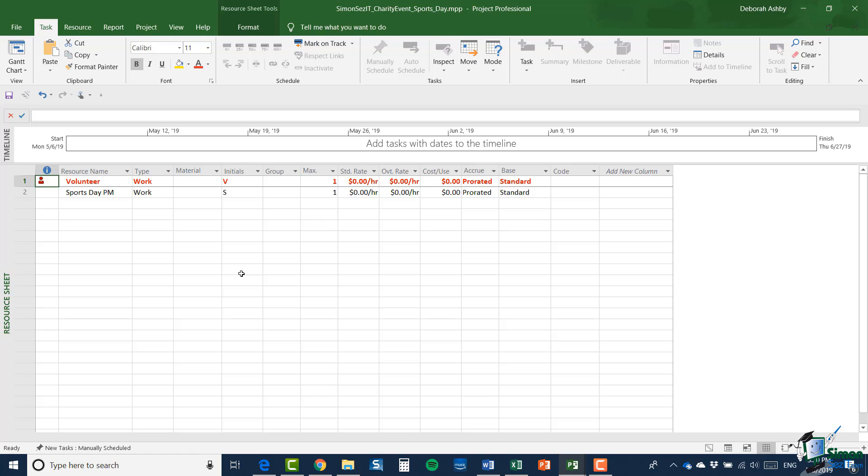Now, in fact, there's an even bigger problem here with the resource because although I now have two projects and they each have, for instance, a sports day PM resource, these sports day PM resources are completely different resources. Each of the projects is using its own resources. And even though each of them has a resource called sports day PM, obviously that resource name is the same on both resource sheets. So as far as Project 2019 is concerned, those are completely different resources. Those two resources are essentially unrelated to each other because these two projects do not share resources.